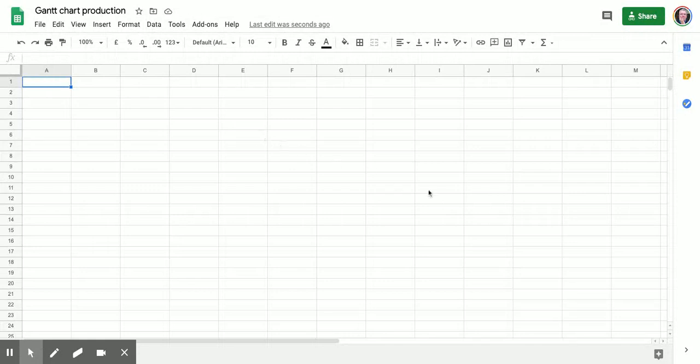So here I have an open spreadsheet, and what I'm going to try and do is make a top line up here, and in that I'm going to put down just number. I want a number for each individual action that is going to be done, so people can refer to it. In other words, I want to do that bit of plastering. Oh, which bit of plastering? Oh, item number 20 or 30, and they can find it quite easily. The next one is actually the activity.